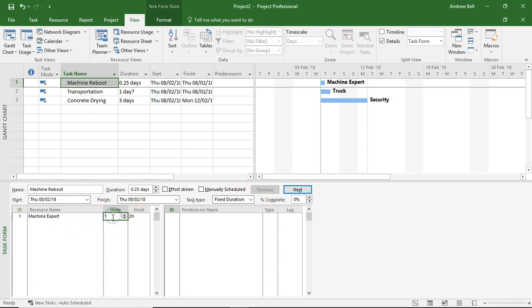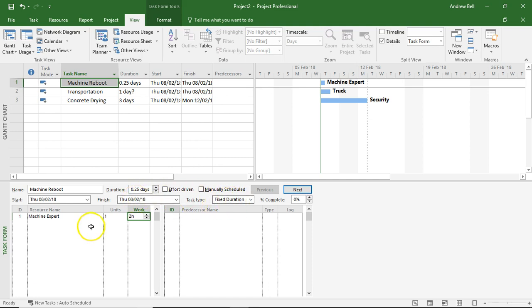We've got one machine expert on it, it's a two-hour task, and it's taking a quarter of a day. Now the important thing here is that it's fixed duration - doesn't matter how many resources I put on here. If I put on two machine experts, the work is increased because I've now got two people, but the duration has stayed the same.